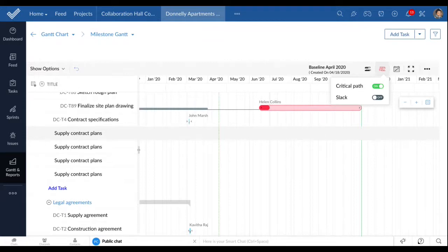Maybe pull in a lot of resources to finish the task on time, or maybe do a greater brainstorming to identify the external factors that affect the completion of the project. Whatever effort it takes to resolve this closure issue can be done with the help of this feature. So that is the business benefit behind critical paths. Is everything clear? I hope you now know what a baseline and a critical path are for.